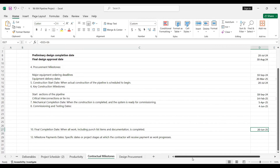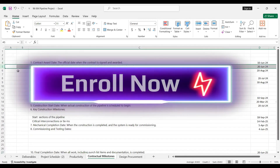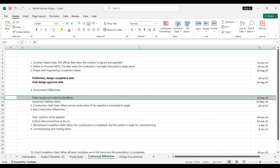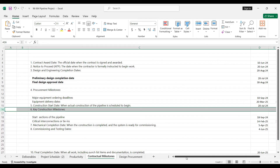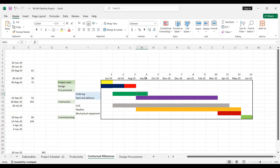A lot of people think this is very tough — no, it's very easy. We are given the project contract date, project start date, design dates, procurement deadlines, and construction dates. This makes our project schedule very easy to develop. This is our one-year project from June 2024 to June 2025. Design phase is first, then preliminary design, then detail engineering design, then procurement overlapping up to September — the ordering deadline — with 10/30/60/90% overlap stages.